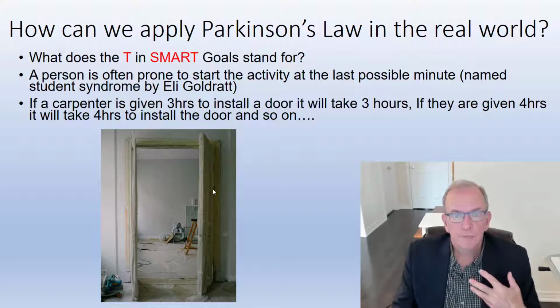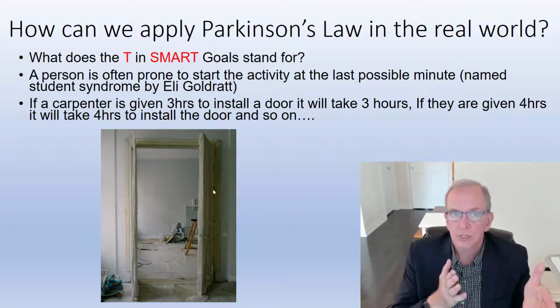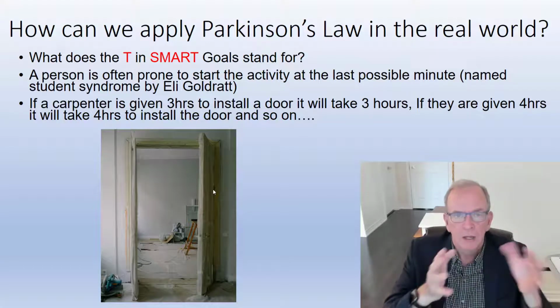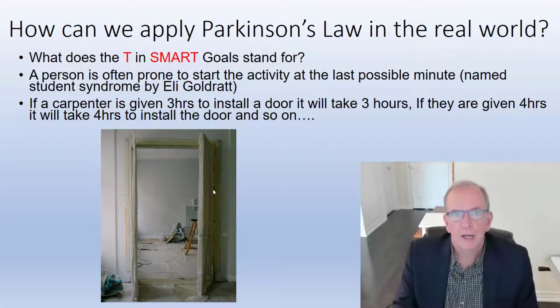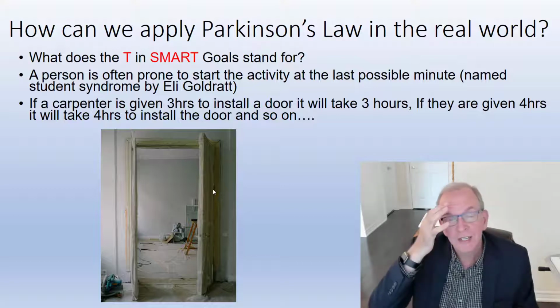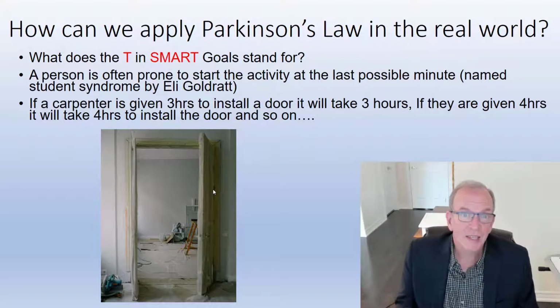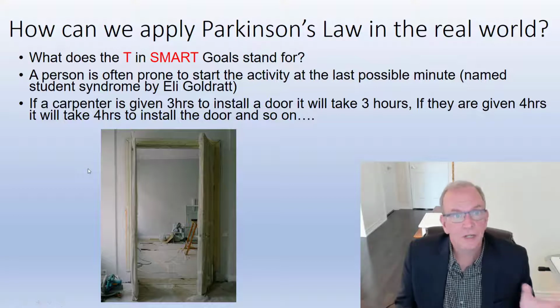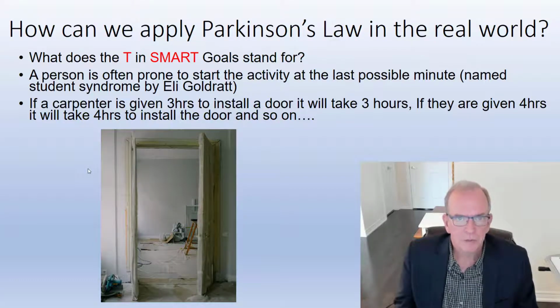And for sure, you've got to also understand, if you're padding your activities in a construction project and you're telling that plumbing trade you've got 10 days to do it, when really it should only take 7 days, then they're going to take that 10 days. Something's going to interrupt. Oh, I've got plenty of time. I'll take this day in the middle and we'll go do that other project that we're doing. And then something happens and they end up still being late with it. And that's kind of defeating your whole purpose.